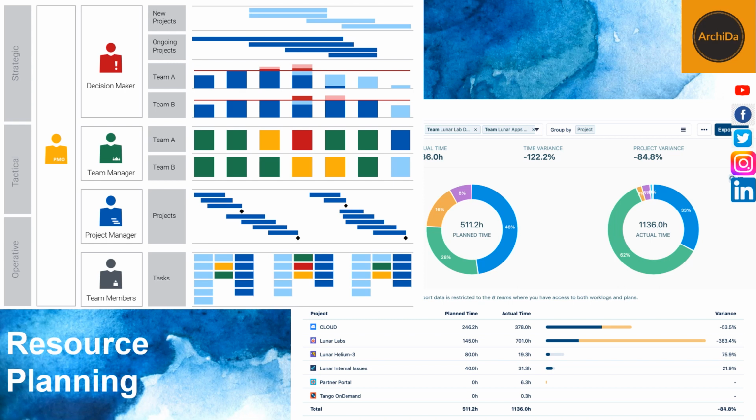The first thing to look at is resource planning. Resource planning is the process of forecasting future resource requirements for a business, project, or a scope of work. To create a resource plan, you need to start by defining the project scope, a document that details the project activities that will be done. Once the project activities have been defined, project managers usually rely on historical data, expert opinions, and resource planning tools to estimate the resources that will be needed.